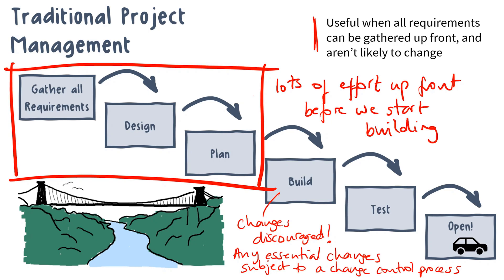Any changes are going to be subject to a rigorous change control process and will be monitored very closely. All in all, for our bridge, because we can collect and analyse requirements with a large degree of confidence up front, a waterfall, predictive, or plan-based approach is a good choice.